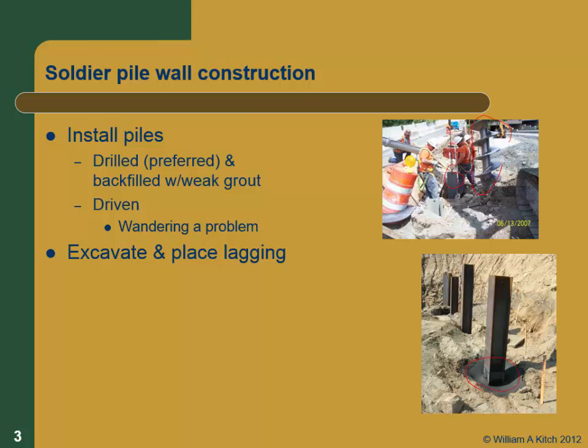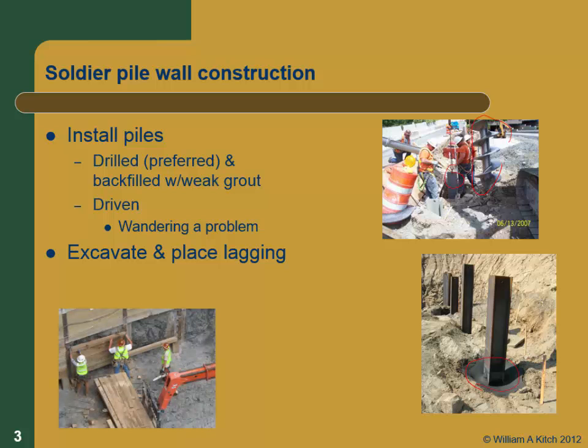Once we've got the piles placed, we're going to excavate and start placing the lagging. And so here's a picture of some lagging placement going on. When you're using H-piles and timber lagging, the material that you're in has to have what they call stand-up time or hold-up time. It has to have enough apparent cohesion or true cohesion that you can excavate below the last level of lagging and install the lagging behind it. Sometimes they actually install some straw or other materials behind the lagging to help prevent erosion and press up against the soil material. But notice here they've excavated a good 6 feet below the last set of lagging before they actually go to place the lagging. So you have to have stand-up time.